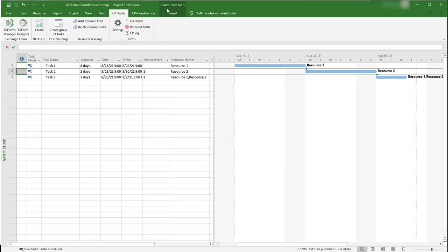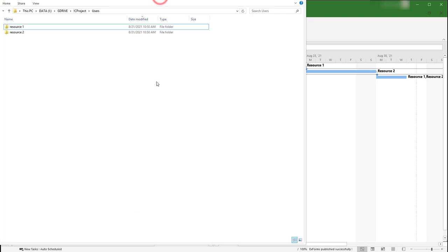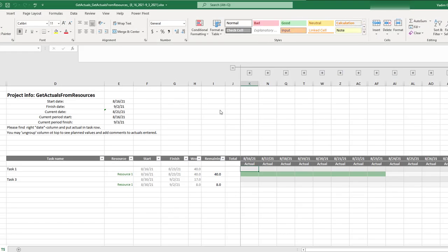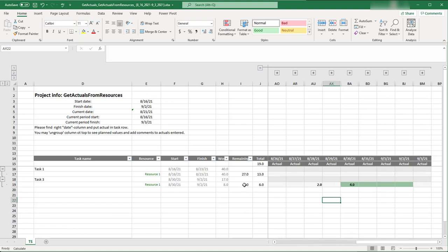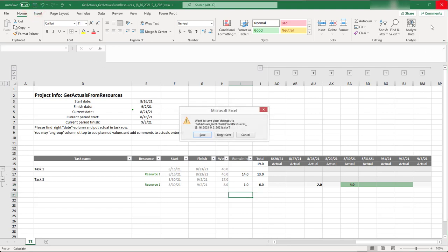After this, an employee can view the timesheet that was created exclusively for them and fill in the actual amount of resources or work completed. This helps to gain information about the actual amount of work done and resources used, and even see when it was used. Employees can also correct the remaining amount of work or resources in this timesheet. Then the user saves the changes made in the Excel file.